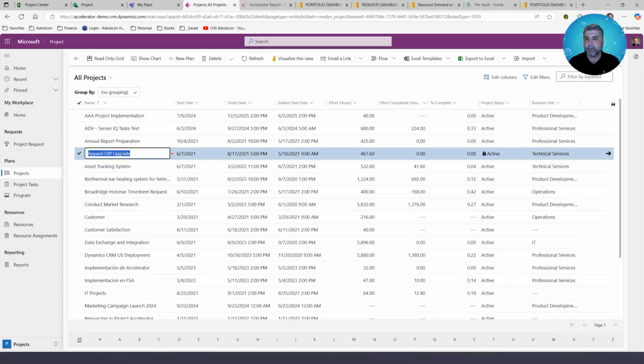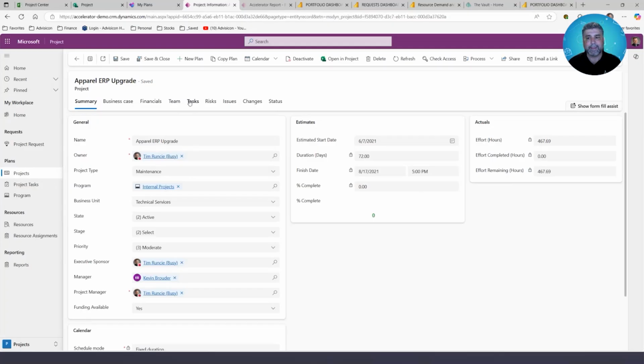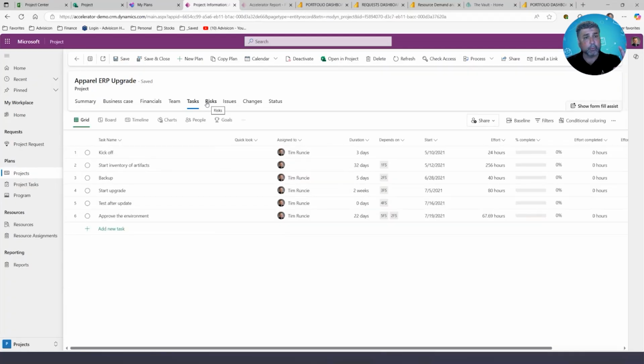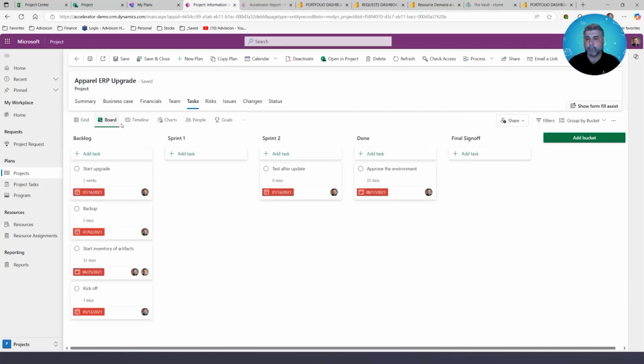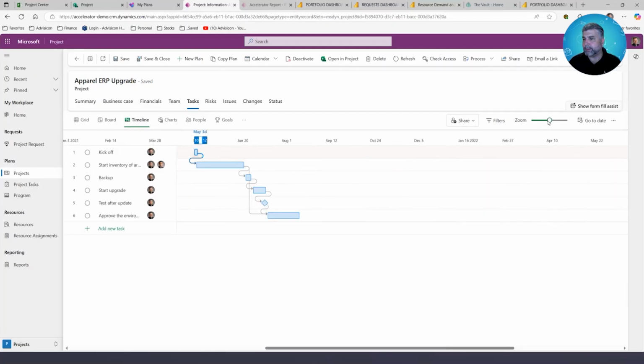Then we might come in and say, we're going to drill in and look at more information around this. If I go to that task, or if I want to keep track of my issues or risks, some people merge the risks and issues into a RAID log, which allows you to say, an issue might have been a risk before. Now I promote it to an issue and we need to create tasks and work around it. I have actions and decisions, so that RAID log might sit there. So this is the idea: you have the whole board view, you have your timeline view. You can certainly get into your Gantt chart, et cetera, and you can zoom in and zoom out. You have all that functionality. And notice I'm nested inside of my environment right here.